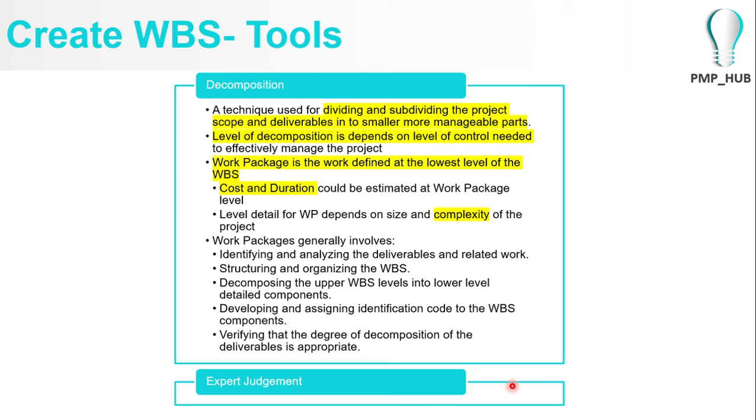Or the duration is exceeding: the flooring man asked for 3 weeks, but he took 4 weeks. So that is where controllability comes in, in terms of cost and duration and the measurement.